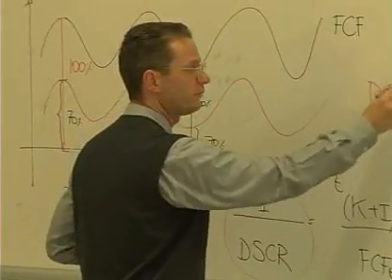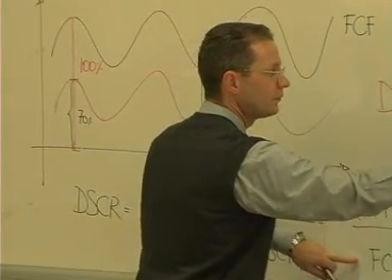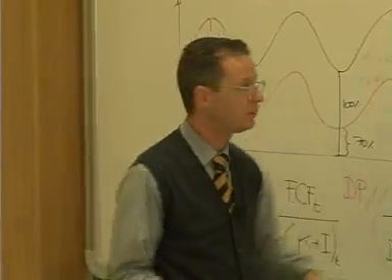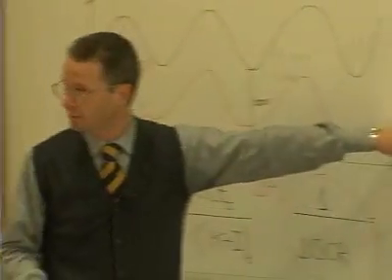Dedicated percentage times free cash flow is exactly the sum of capital plus interest at time t. But dedicated percentage is exactly the inverse of the debt service cover ratio. So if you fix a minimum debt service cover ratio, you can simply include it inside the loan agreement and say, based on the minimum debt service cover ratio, the dedicated percentage that we want to get every year is 1 divided by the debt service cover ratio that you have selected as a minimum level. Okay? Quite easy.